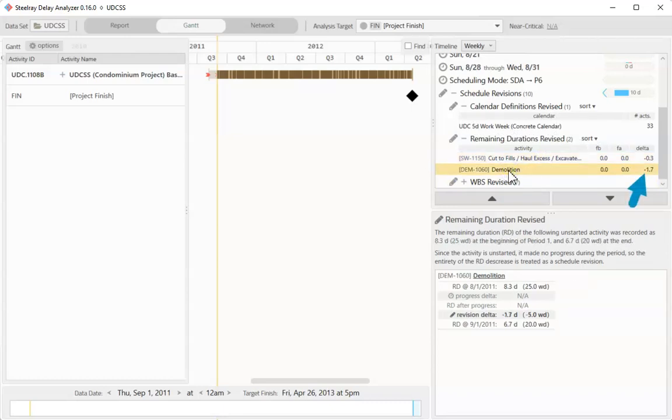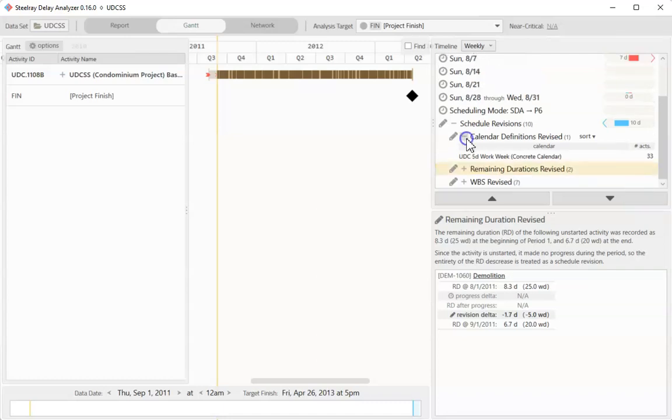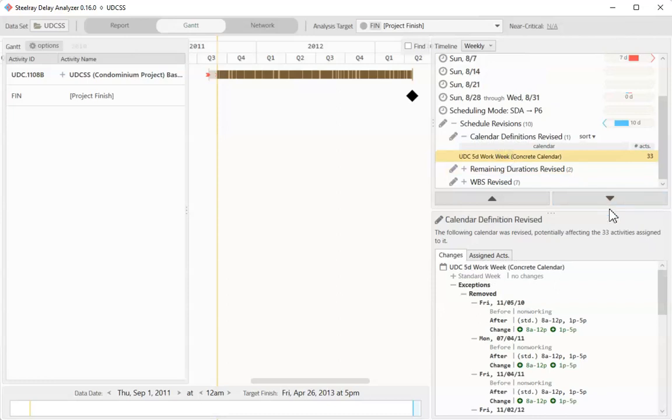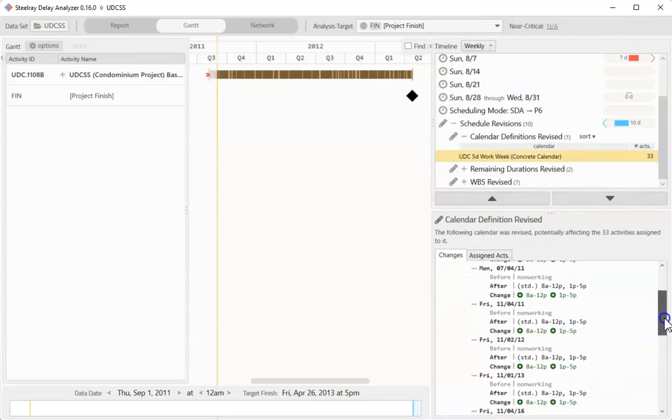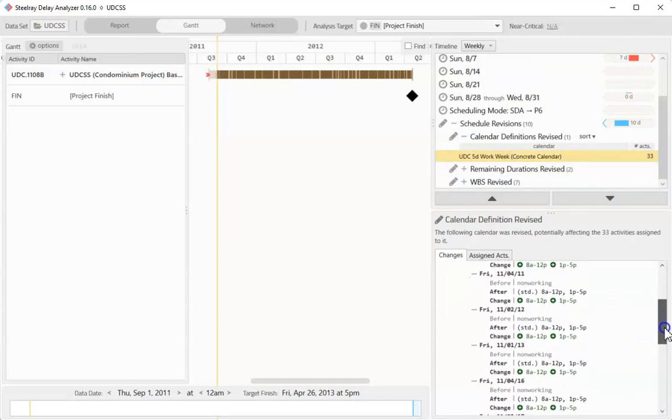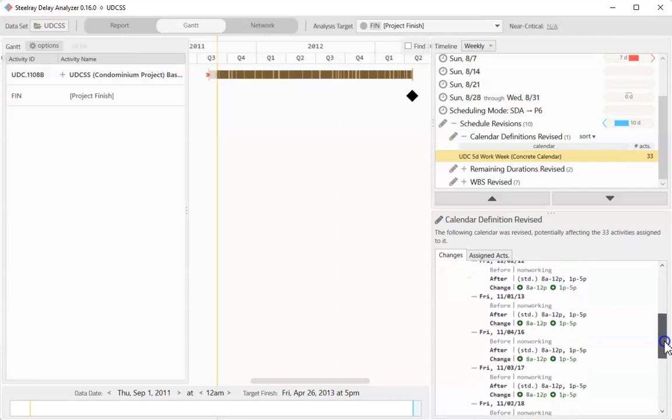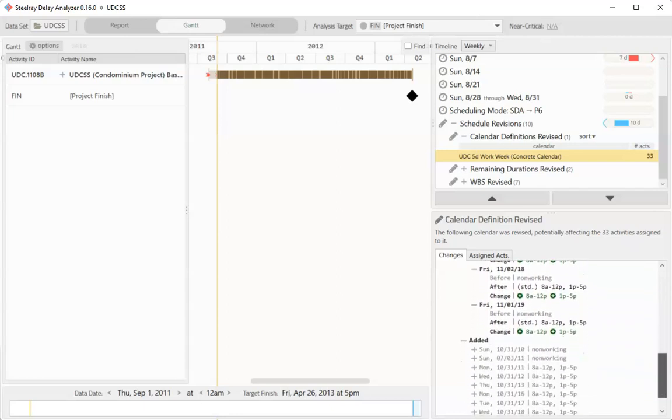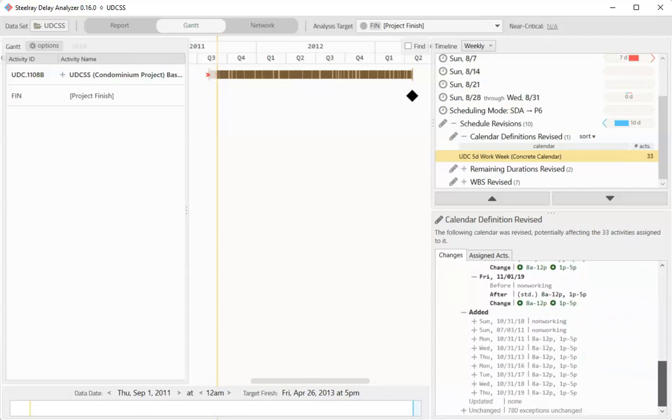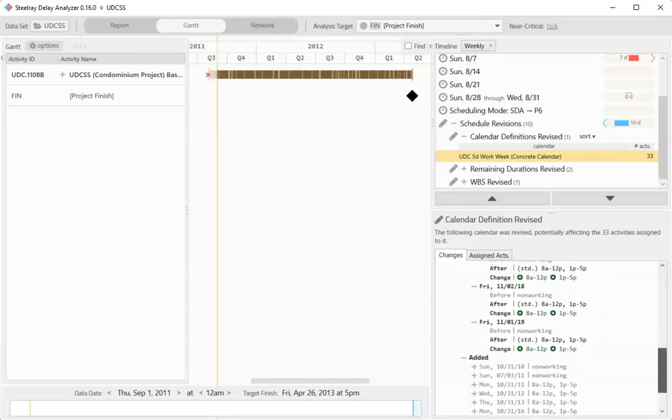However, when I look at the calendar revisions, I can see that a bunch of exceptions, i.e. non-working days, were removed from the calendar. And these calendar modifications impacted a bunch of activities.